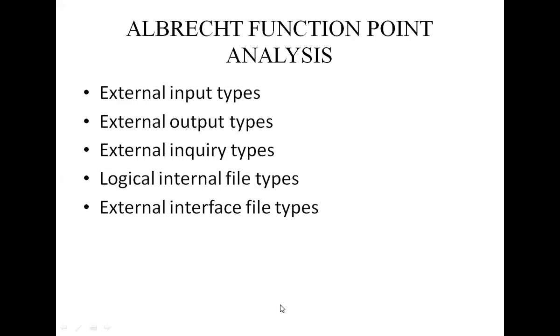Here it comprises 5 major components: external input type, external output type, external inquiry type, logical internal file type, and external interface file type. First we move to the external input type. External input types are input transactions which update the internal computer files.